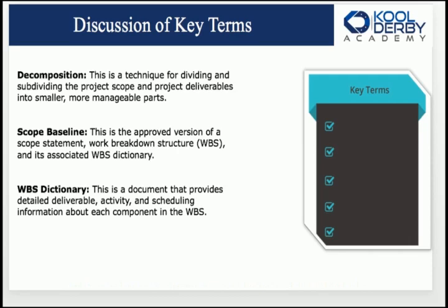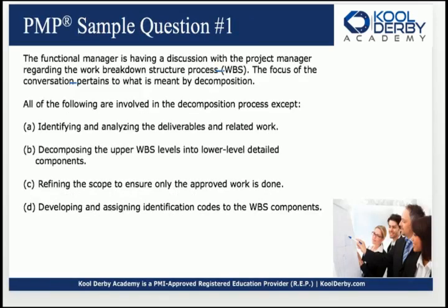It's more general. For example, you can ask somebody, hey, you got married last year at venue X. How much was it, and what was the overall price? They say, well, it was about $25,000. So that's a top-down estimation. It's a quick number. It's not as precise, but it's important to get. A bottom-up estimating process is part of the WBS, and it gives you a detailed answer, or more of a detailed answer.